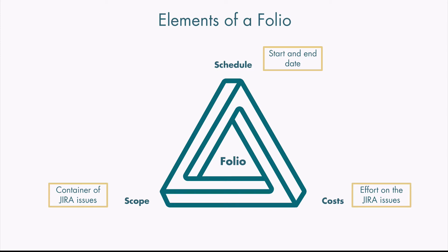The schedule of a folio is always the start date and the end date that you define. The costs on a folio are the efforts on the Jira issues that are within the scope of the folio. Each time you log work on a Jira issue within the scope, Tempo Budgets will convert this work log into a cost and track the actual costs on the folio. You can also easily enter other costs on Jira issues by adding a cost directly on the issue itself.